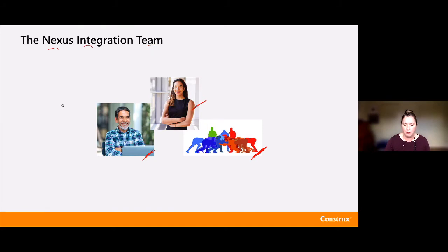So they are accountable for ensuring that by the end of the sprint, we have a done increment where everything is integrated. And that's not by actually doing the work. That's about building any tooling or infrastructure, mentoring, coaching, establishing standards, establishing practices, other things that allow the other teams in the Nexus to do that integration.